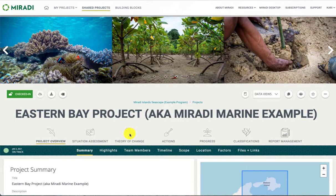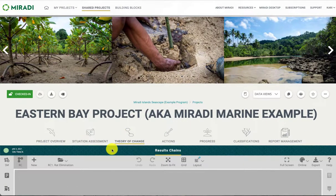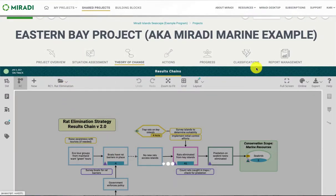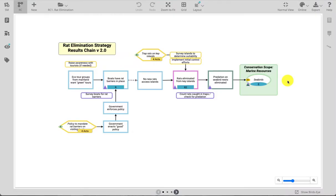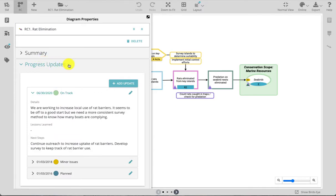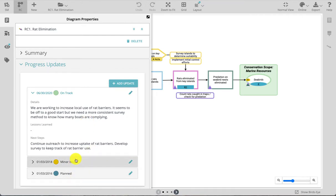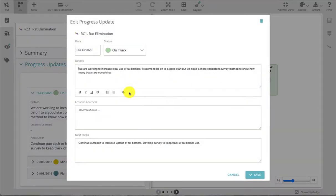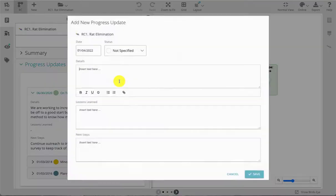Under the theory of change tab, navigate to the results chain that includes the content you want to report on and expand to full screen view. The overall progress for a results chain is not visible on the diagram itself but it can be viewed and edited in the diagram properties from the upper left of the diagram canvas. Under the progress updates section you can see the most recent progress update for the results chain as well as any past progress updates. If you have editor access you are able to edit any of the existing progress updates or you can add a new update.